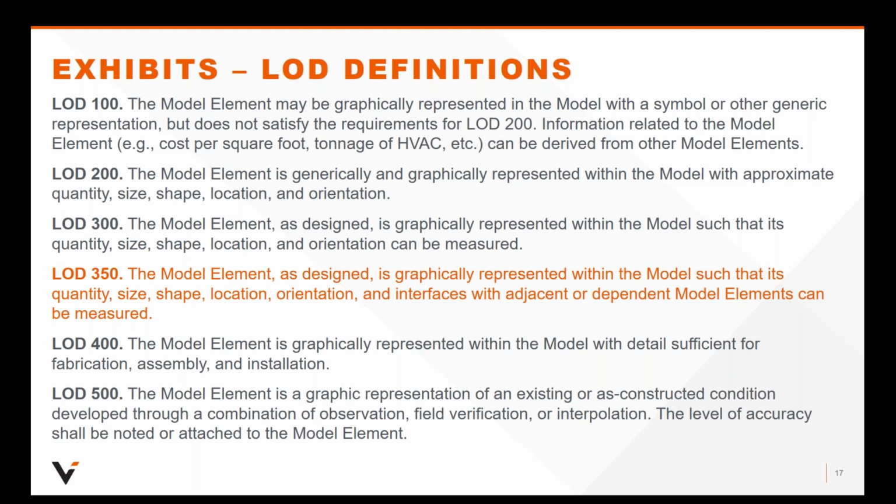Now, let me correct one bit of information. Some firms seem to use LOD to be short for level of detail. That is not the case, since some BIM information that has not been developed extensively actually might include a high level of detail. Others that have been developed may not have the same extensive level of detail. So it's not a detail issue, it's a level of development. The reliance is not on the detail, but rather the state of the information's development.